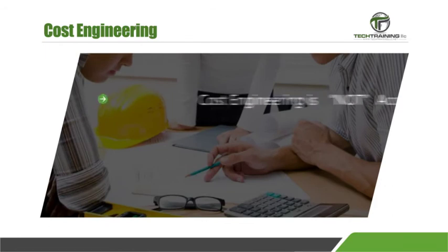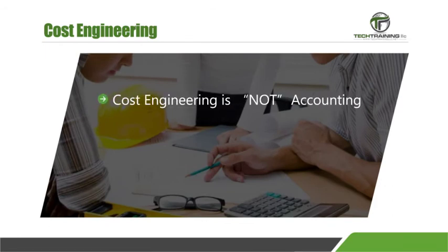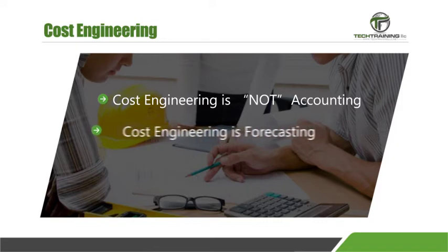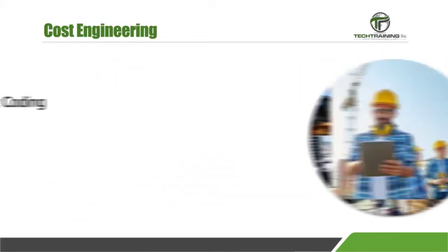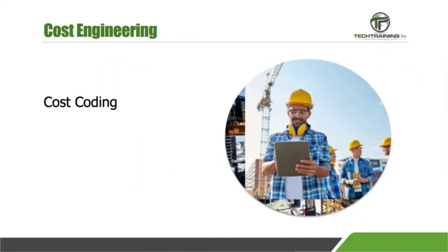Cost engineering should not be confused with accounting. Accounting is historical costs, taxes, invoicing, and so on. Cost engineering is forecasting and trending, and using project information to measure how well a project is doing and forecasting the project's potential outcomes. Accounting and cost engineering do work together.